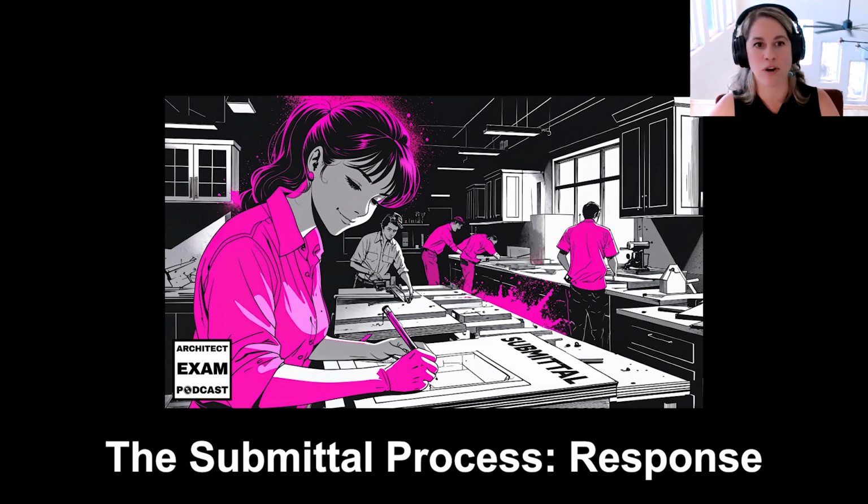So that's why we have one of those four notes that I mentioned before, no exceptions taken, approved as noted. Those really show that the architects reviewed them, but they're not taking any of the legality on. They're not taking any of the liability on because it is ultimately the general contractor's means and methods and control in implementing those subcontractors' work onto the project.